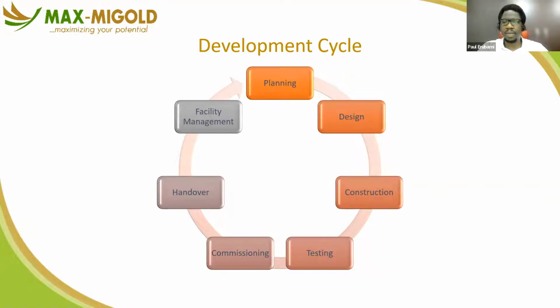It is at this point that you take the design drawings and the bill of quantities and put them together to create a contract. A construction contract is what you produce as a third output from this design stage, and then you go into bidding, because you want the contractors to see clearly from the drawings, the bills of quantities and the contract terms, payment terms, contract implementation process, and all of that, how this project will be built. They can place a bid that makes sense. And then when the winner is chosen, you move into construction.